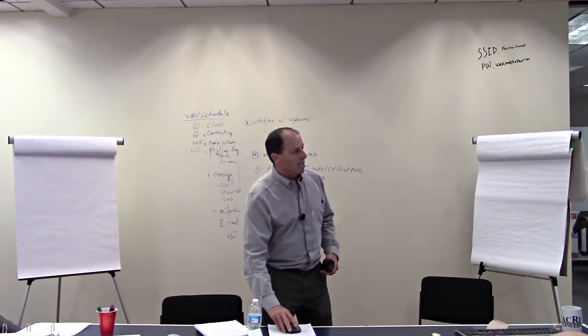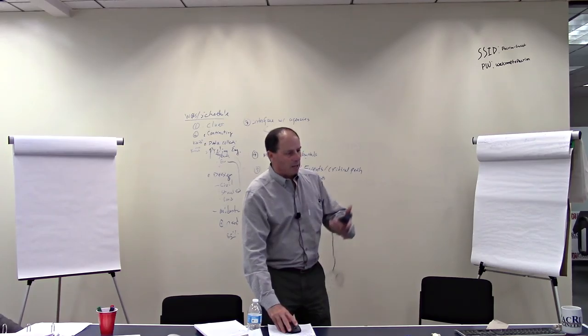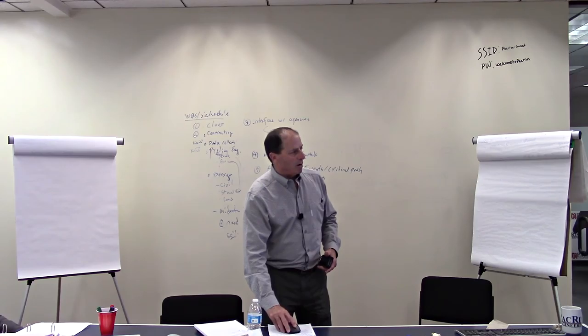So we want to make sure that we're using lessons learned. We run into something where maybe there was a bid bust or there were a ton of RFIs. So on the next one, we learn, hey, people ask this question. Let's address it up front in our design. So we cross-check some of those things that we've learned, which never ends.